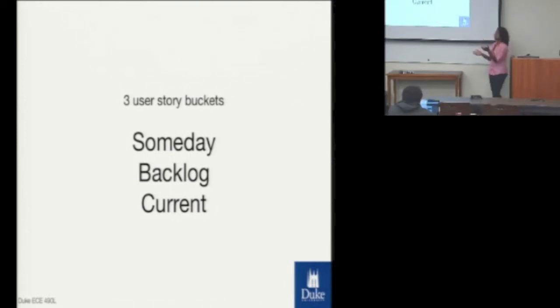Okay, so I'll give you a really simple example. One of the things that we had at BusyBee was that we all worked remotely, and sometimes we worked in different time zones, right? But a customer issue would come up, and I wanted it to be solved immediately. But if every time a customer issue came up, I interrupted the engineer, then he would never get anything done, right? So we came up with this format of, we're going to post all of the requests as they come up in a queue, possibly with some priority behind them, and then it's going to be the responsibility of the engineer, when they either take breaks or at the end of the day, to review them.